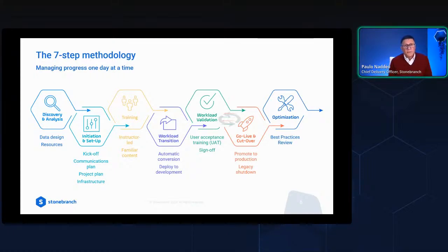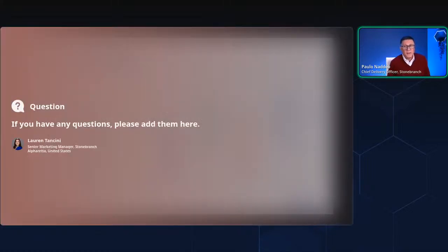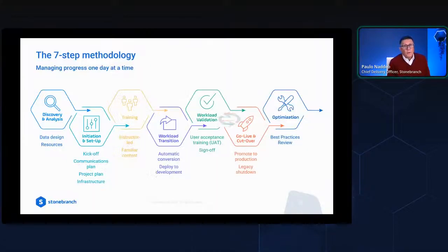Because this process is not perfect, there are what we call exceptions, right? This tool will produce the objects for UAC, but also a report with all the scenarios and the objects and the data that it did not understand. So our engineers will have to go through these individual exceptions and understand what is wrong, right, with the extract, with the object, and what needs to be changed.